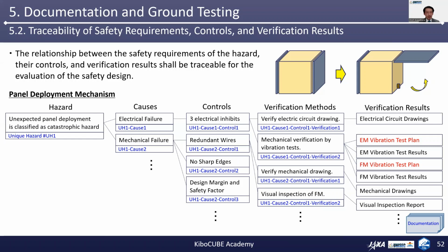So here it is very important that the test plan is also a part of the verification documents, as this shall be evaluated by the safety review before conducting the actual test. As also indicated in the figure, these items listed shall, in general, be identified with corresponding ID numbers, and the relationships between them shall be kept tracked.